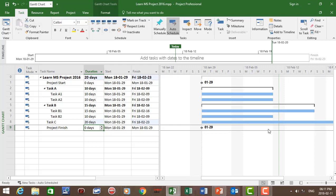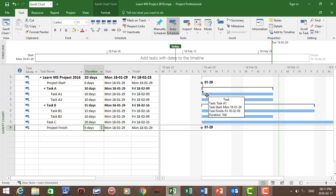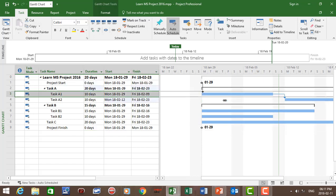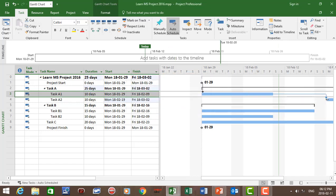Now for the dependencies, let's start from the top. Task A1 starts first. There is a finish-to-start dependency between Task A1 and A2, so drag and drop to create it. However, Task A2 is going to have a lag of five days, meaning Task A2 is going to start five days after A1 is completed. Double-click on the arrow and set a lag of five days. So A2 will start five days after A1 is completed.